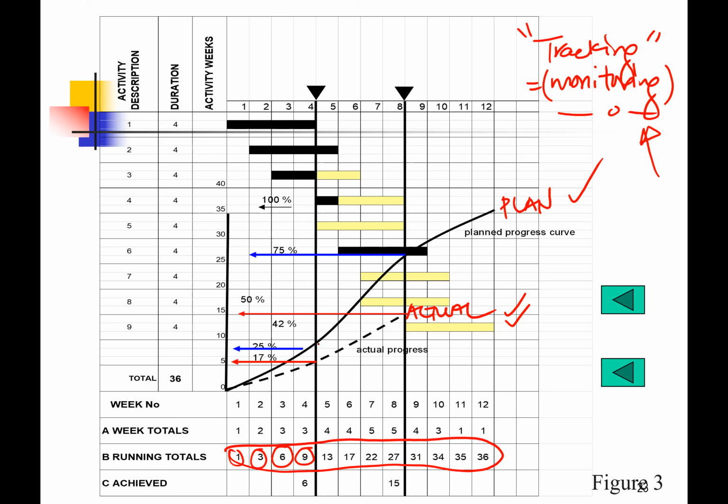You notice in the fourth week, if you come up with a measurement or report, your plan is 25%, but from your actual, the line there, 70%. If you take a simple mathematic, 25 minus 7, that could be around 8% delay on the fourth week.